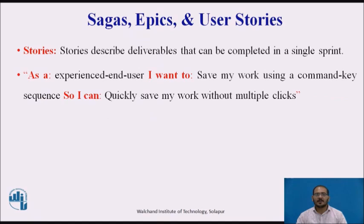User stories are the most granular description of functionality. Stories describe deliverables that can be completed in a single sprint. An example is: as an experienced end user, I want to save my work using a command key sequence so I can quickly save my work without multiple clicks. It's important to note that the product owner and development team must refine the stories so they are actionable. In many cases, sagas, epics, and stories provided by the customer must be decomposed into more discrete and therefore actionable units of work.